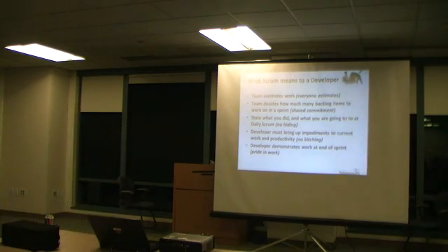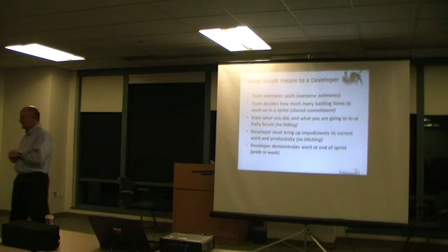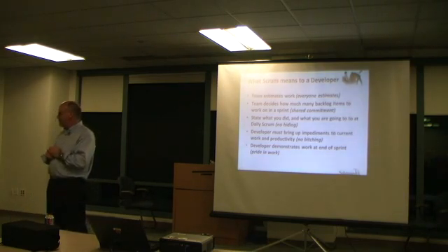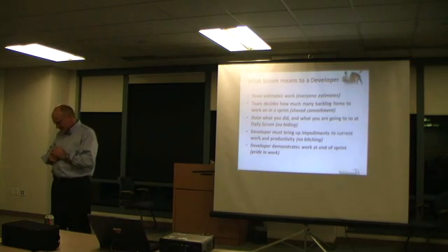Well, it's also not so much about splitting the story up, it's just tasking, which is essentially up to the team to develop a set of steps, because you can't go from here to South Seattle in one step. It's not possible. So even if you're writing a lot of code, it's like, well, okay, I'm dealing with the database interface function, I'm dealing with the API layer interface, I wrote the mocks for the testing framework.